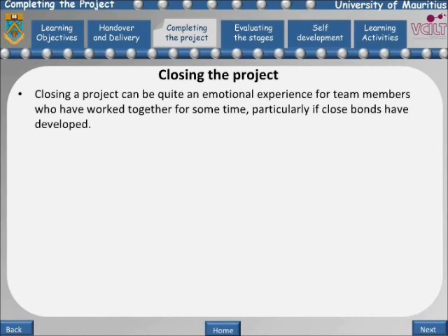Closing a project can be quite an emotional experience for team members who have worked together for some time, particularly if close bonds have developed. The manager of a project has some obligations to staff who have worked for some time on it. Build into the plan a closure interview with each member of staff so that their contribution can be formally recognized